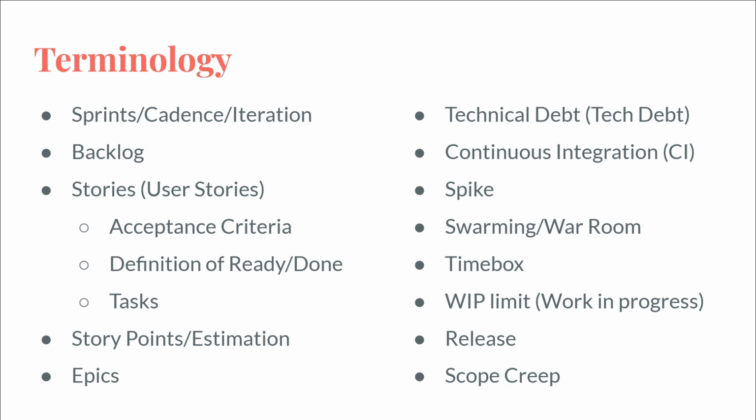That's your cadence. It's every 2 weeks. You take on new work and you try to get all that work done in that 2 weeks. Any work that you don't get done goes into the next sprint, and that is called carryover. You're carrying work over from the previous sprint. If you get stuff done early, then you could grab some stuff off of the backlog.